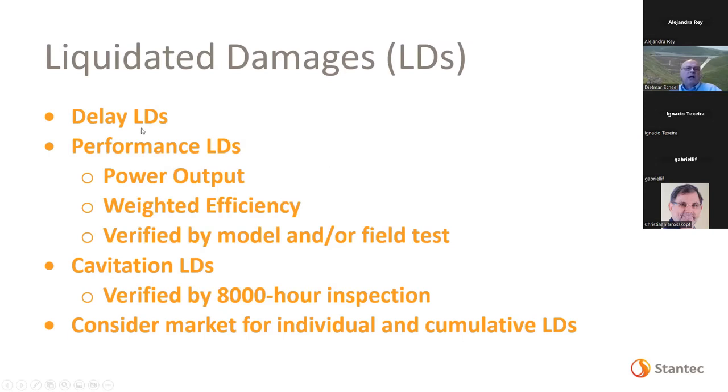By the way, going back to delay LDs, it costs you quite a bit of money to keep units out of service. You cannot expect to recover that lost power generation from the contractor. His contract is not going to be worth the delay LDs there. So the idea is you want to minimize your delay LDs.